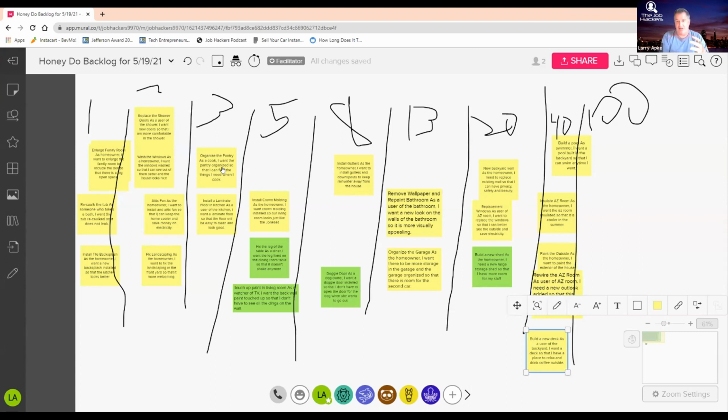And I can start to calculate a value to effort ratio. And the higher the ratio, the sooner I should do it, theoretically. And that's going to help me sequence the work. Right? You with me? I'm going to stop sharing this.